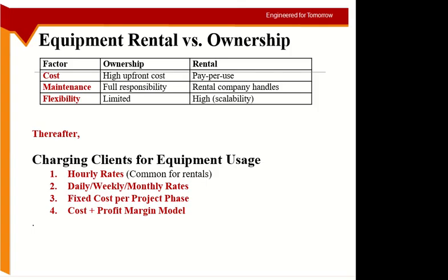The equipment can be charged to the client on an hourly basis, and this is very common if you are taking the rental equipment, because you are paying on an hourly basis to the rental company. So it's easier for you to bill the client on the same basis. If the project is longer, then this can be daily, weekly, or monthly rates as well. So if I need a dumping truck for 2 weeks, then the rate can be per day or per week or something like this.